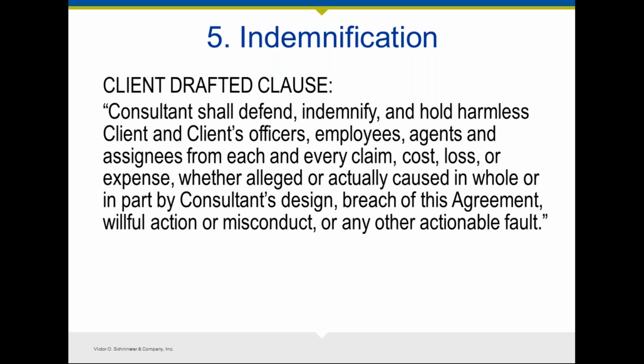Furthermore, you have an upfront obligation to defend this cause, and for reasons stated earlier, these types of clauses create a challenge because they're not an insurable obligation, and they could further open you up to an indemnity obligation that is fairly broad and could essentially be uninsurable.